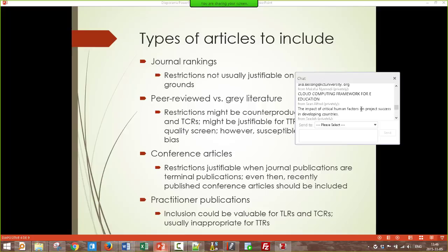For example, bias. So one may go in and, let's say you have an estimate for execution, and the estimate is, let's say, $100 million. But you may say, well, that's too much, and you force the number down, for whatever reason. Okay, so that's bias. Can you give another example, please? So bias would be one human factor. Could you give another, please?